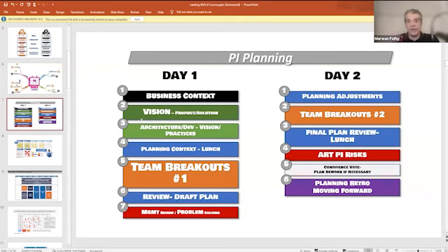People start to interact together, conversation going back and forth, and we have this team breakout where each team will sit with the PO and the Scrum Master to see, hey guys, can we deliver this feature? Can we decompose these features into stories? Can we plan that? And this usually takes around 3 to 4 hours. Then we come back as each team, and we should have some luxury to push back. No, this is too much for us to take. We cannot work on all these features.